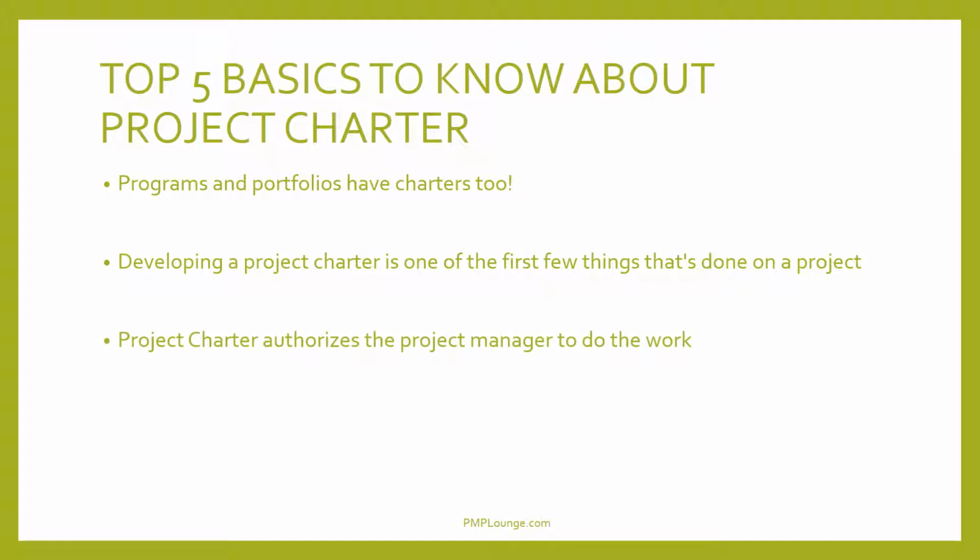Project charter authorizes the project manager to do the work. There is actually a section in the project charter which names the project manager who is going to lead the project. Your name, if you're the project manager, will be clearly mentioned there. If your name is not there and you have a project team already and they go over the project charter, they might come up and question you, how come you are leading the project when you are not the project manager listed in the project charter? So the authority that you have over the project team will come only from the project charter when your name is mentioned in it. In fact, some of the charters also go to the extent of mentioning the kind of authority the project manager will have over the project team in the project charter itself.